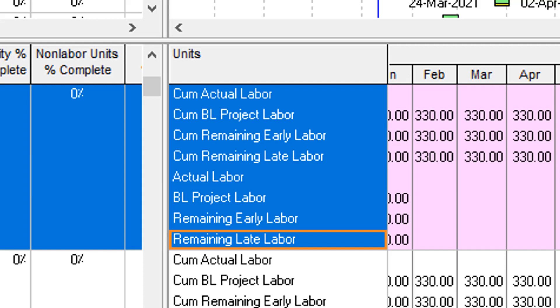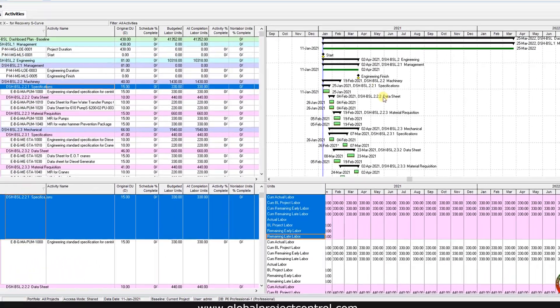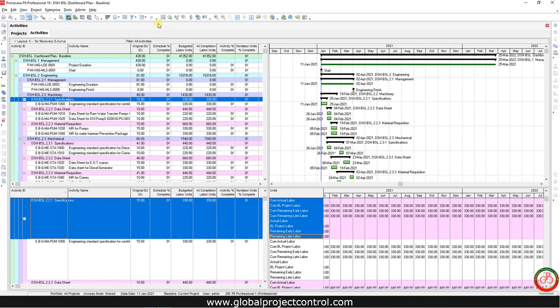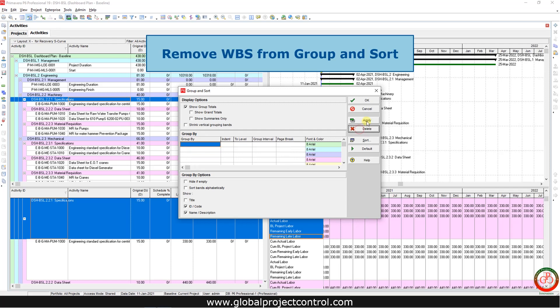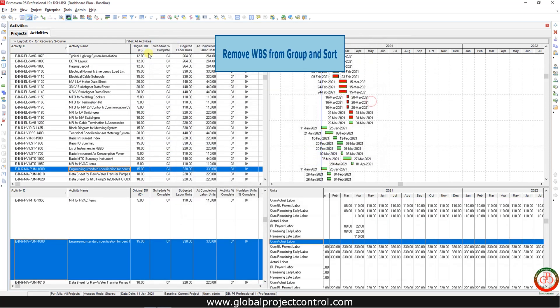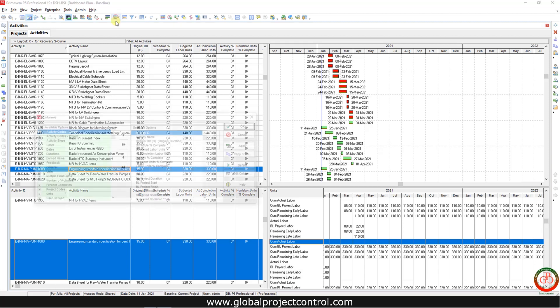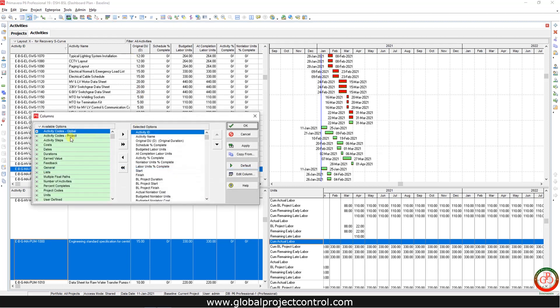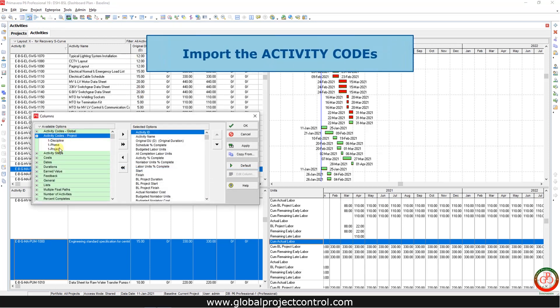Then I open the group and sort and remove the WBS and press apply. Open the columns, then insert activity code to the available data.